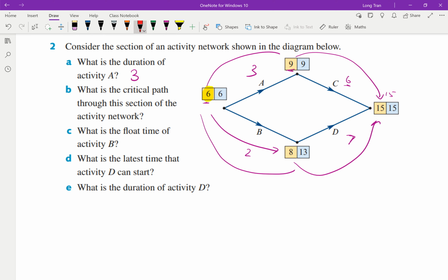But can you see that if you go backward scanning, there's a bit of a change here. So from 15 to 9, can you see that this is also still 6? So it means that duration must be 6 there. But then if you look over here, the duration is 15 take away 13, which is 2. And then from 13 to 6 here, 13 minus 6 gives you 7. So there's a discrepancy here. And that's likely due to the fact that only one of them is being accounted for. And so this is how you would want to be calculating it.